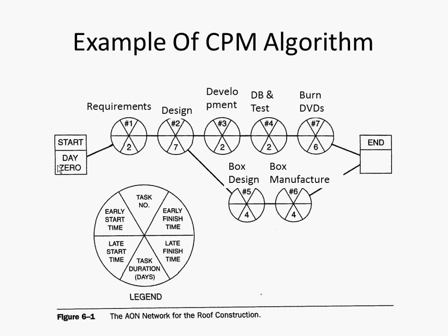And so the latest this could start would be 2, and the latest this guy could finish would be 2, and the latest he could start would be 2. Ladies and gentlemen, we've just run the CPM diagram for this. On the forward paths, we ended up taking the maximum. Remember, this 19 was the maximum of this 17 and 19 here? So when things come together, joins occur, we take the maximum. Going backwards, we took the minimum of these 2.